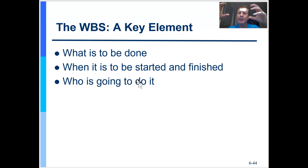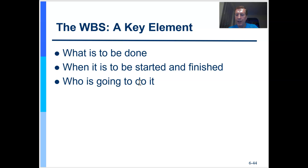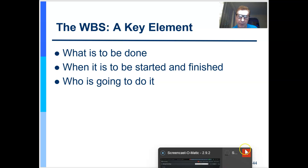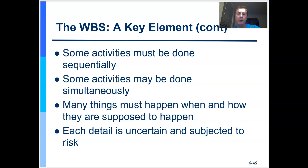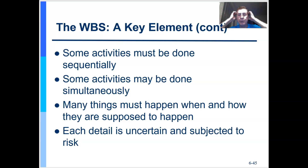From the requirements gathered from the mind map, you can build a scope statement and a work breakdown structure — breaking down the work into manageable pieces. The work breakdown structure is important: if it's not in your work breakdown structure, it's not in your project. Don't do it. As a project manager, people are going to push you to do it, and you have to resist. It's everything you're going to do, all the requirements on the project. You'll break it down through a process called decomposition — starting at the scope statement and building it into boxes.